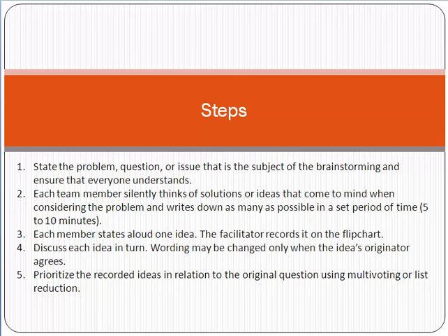First of all, the problem, issue, solution, whatever, should be properly stated. As a project manager, you should state what actually the problem is, what actually the objective of the brainstorming session is. For example, if five people are there, one by one you can call them, and first of all you have to state what actually the problem issue is. Every person should have clarity about the purpose of the brainstorming session.